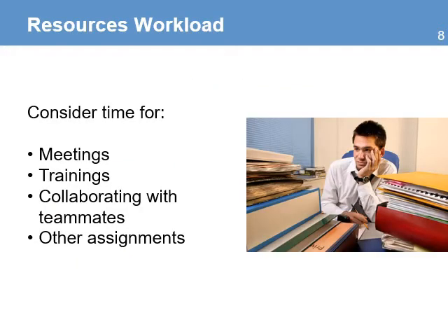When you're assigning work to your team, you have to take into consideration the time your team will be busy with meetings, trainings, collaborating with teammates, or any other assignments. You cannot assign someone 100% of their time to work on the project activities. Usually, all these extra activities can go as high as 20% of their time. That means that out of the 8 hours that you have in a day, only 6 hours can be dedicated to actually working on the project activities that you're assigning to the team.